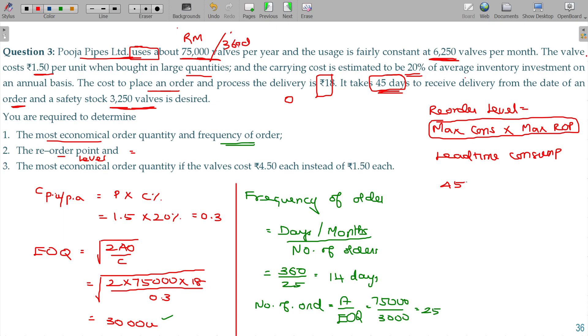So 360 days is 75,000, per day is 75,000 divided by 360 - that's the daily consumption. I have to wait for 45 days once I order, so 45 days is the lead time consumption.